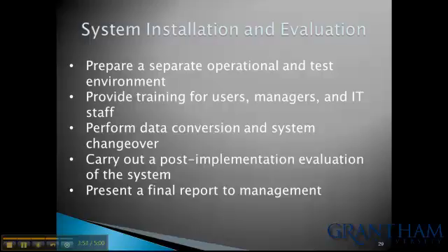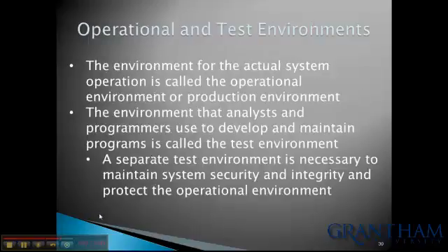Prepare a separate operational and test environment. Provide training for users, managers, and IT staff. Perform data conversion and system cutover. Carry out a post-implementation evaluation of the system and present a final report to management. The environment for actual system operation is called the operational environment or production environment. The environment that analysts and programmers use to develop and maintain programs is called the test environment.